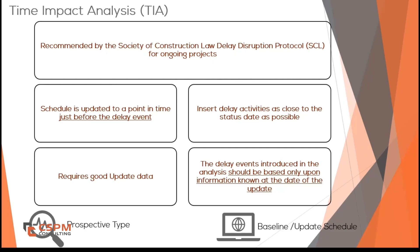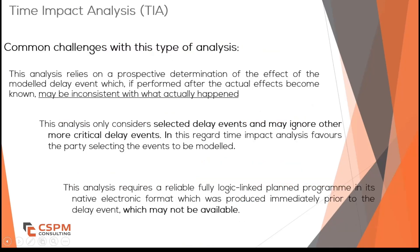But Time Impact Analysis isn't without its challenges. One common issue is ensuring that you have an updated schedule right before the delay event. In some cases, the schedule might not have been updated frequently enough, forcing you to rely on older data — which can reduce the accuracy of your analysis. This is a key limitation to keep in mind when using TIA.